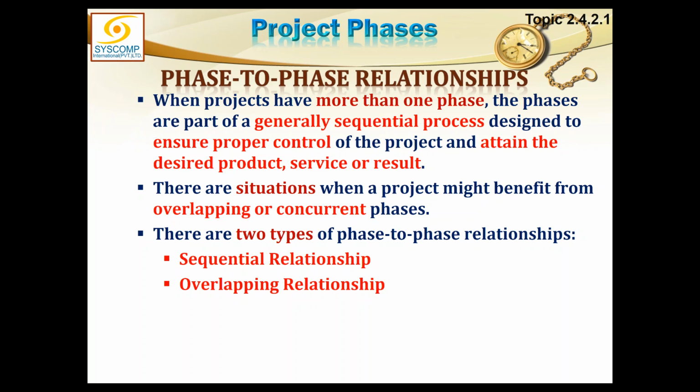If you are a risk taker, you may say that, okay, this work is held up due to certain reason, and ultimately it will finish, but why not start the next phase simultaneously? Because whatever job I do on phase 2, the next phase, would be at risk of being cancelled based on the result of the approval of phase 1.